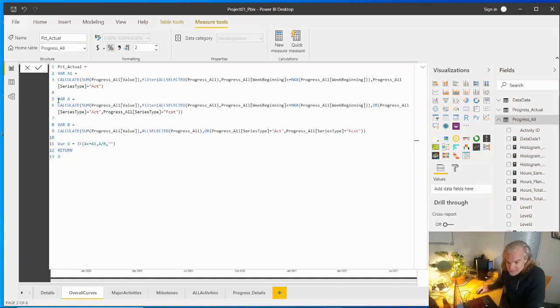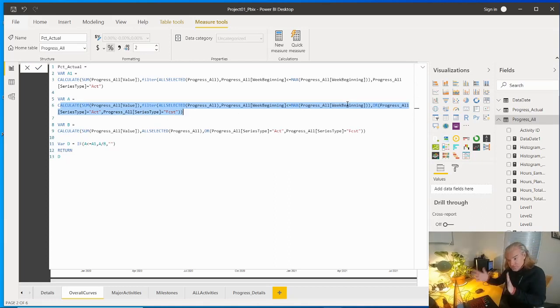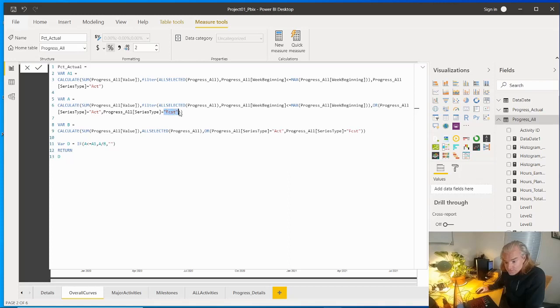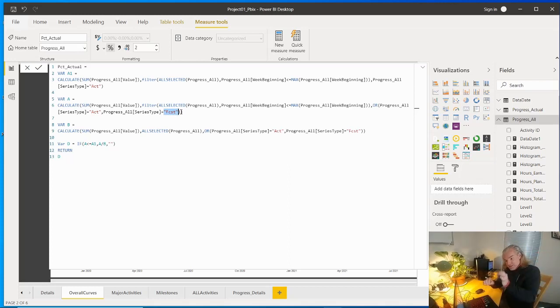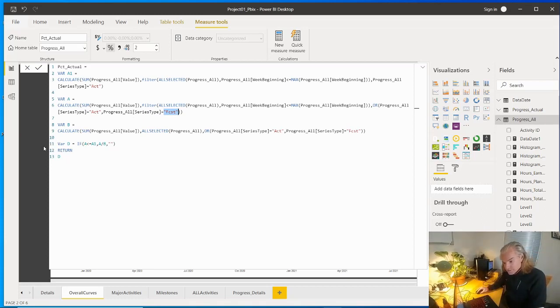A is our total to date, calculated using some variables saying let's just go sum everything up into the current date. Wherever you are, you want to sum everything before that, using a condition where the data set is either actual or forecast. So that will be the running total. That'll generate the total hours from zero to whatever the total hours is, incremental for every period for both the actuals and the forecast, everything in there up to a specific date.